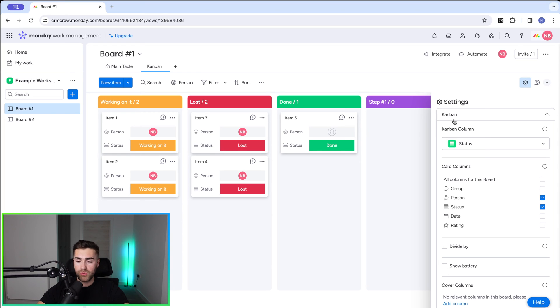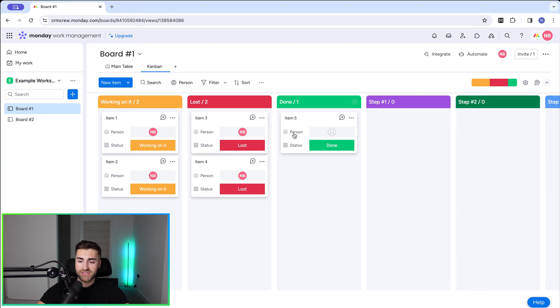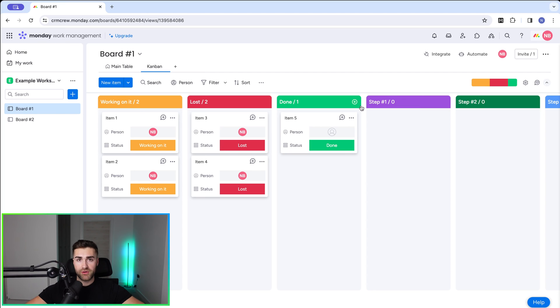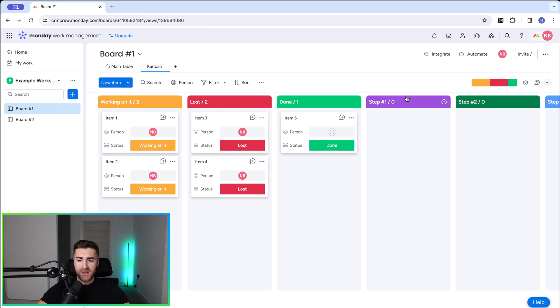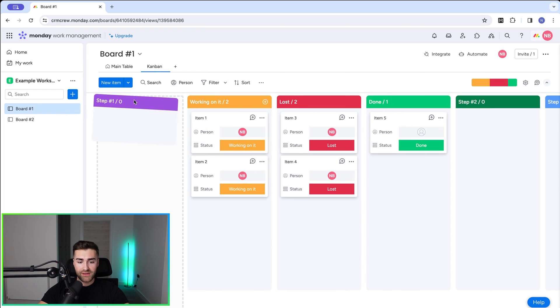So once you've got all of your Kanban settings ready, I'm going to turn the show battery back on for the sake of this video. I like that feature. I'm going to remove the settings. And then there is a good chance we need to reorder our status or our process. Because quite often what happens is you add a number of different options to the status column, create Kanban view, and then for whatever reason, it doesn't populate in order. Now, in order to make changes, it's really simple. All you need to do is just drag that status to the different positions.